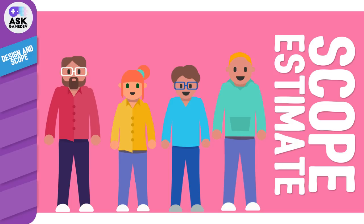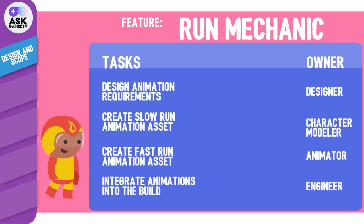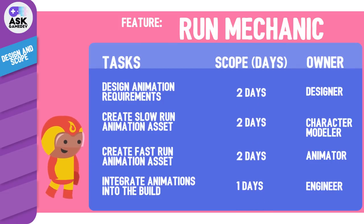For example, let's consider a hypothetical run mechanic for a character. A designer, a character modeler, an animator, and an engineer may all be required to help get the character to run in engine, and we would make estimates for each discipline's participation in man days. Estimates are a best guess and are often revisited throughout development. You'll want to repeat this estimation process for all features in your game, grouping tasks so you can see the relative time costs of each major feature. Once complete, you have defined your project scope.